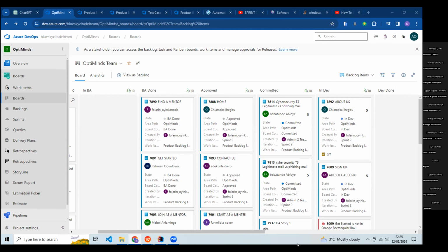Your team needs to do the sprint planning, yeah, and then out of the stories they've estimated, they will pick some of them or all of them, and they put them in committed. Now, as a key way, right, stories in committed are the stories that you are going to be working on in that particular sprint. So as a key way, you will pick that story up, right?